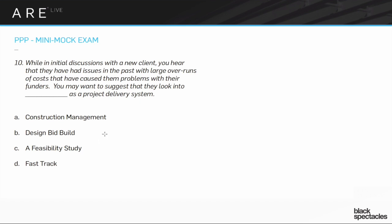Design-bid-build, as I just said, is that kind of longer one where you have the design, then you do the bid, and then there's the construction. The big advantages of design-bid-build are that I get to the end process, I get to about here, and when I've got that bid and I've got the GC about to start, I actually have a pretty good understanding of that dollar value. Up to that point, it may be a little loose because you're counting on the architect to do the bidding, not a general contractor.